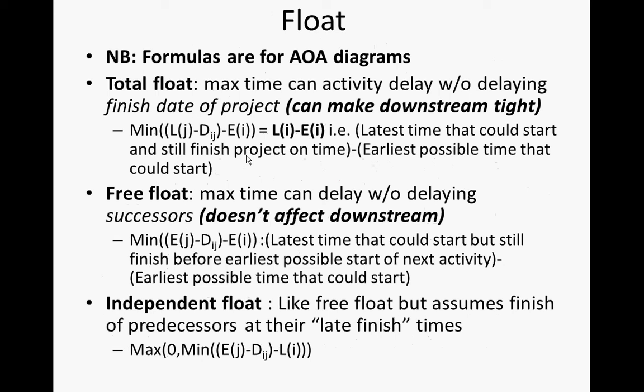Okay? So the float associated with a given activity is simple to compute in this simplified version of these methods, this sort of pure CPM. Here you just subtract the early start from the early finish, or the late start from the late finish. You take your pick. But it's going to yield the same difference either way, because this guy is just these plus this value. So you compute the difference. This has a total float of 4 associated with it.